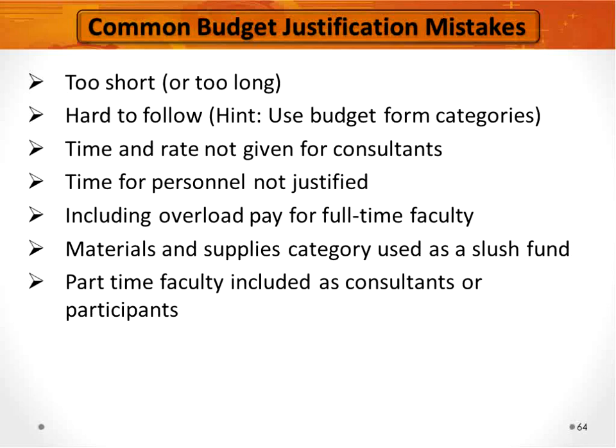Another thing to avoid is a lot of "to be hired" on your budget. If you are going to have to hire someone, in supplementary documents, provide the reviewers and program officers with a job announcement. What kind of qualifications would you look for in this person? Perhaps you have somebody that you already know you think you would hire. Should this proposal go forward to an award, you could actually name that person and state that. This is an example of a person with the correct qualifications that could potentially be working on this project should it go forward to funding.